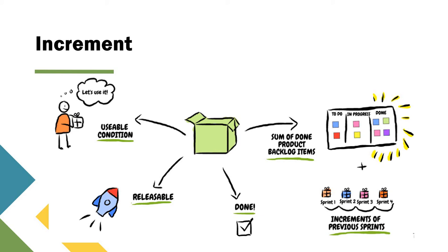At the end of the sprint, a new increment must be a working product, which means it must be in usable condition. So it must be in working condition regardless of whether the product owner decides to actually release it. The Scrum team needs to have a shared understanding of what is considered to be an increment. That same understanding guides the team in knowing how many product backlog items it can select during sprint planning. The purpose of each sprint is to deliver increments of potentially releasable functionality.